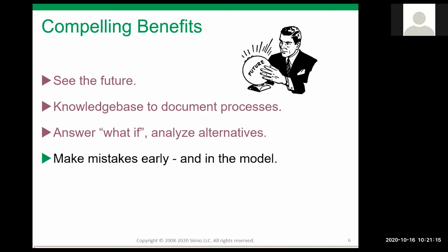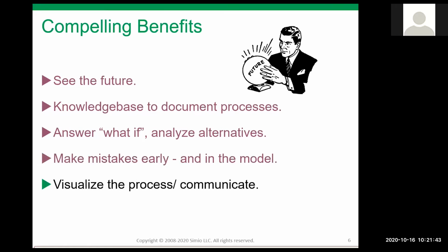And I can't tell you how many times they've said, well, gee, we already ordered the conveyor. We've already paid for it. We can't cancel it anymore. Whereas if they had done the model early, they could have seen in that model early that an AGV was a better solution than a conveyor or whatever the case may be. So models give you the opportunity to explore and make mistakes at no cost.